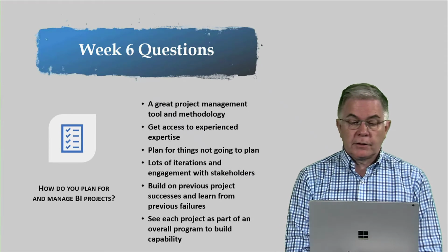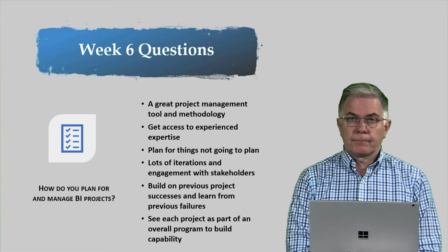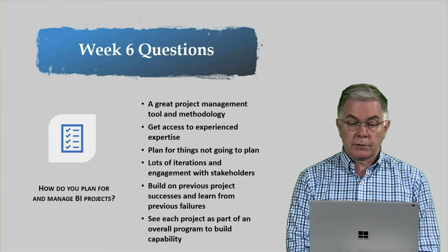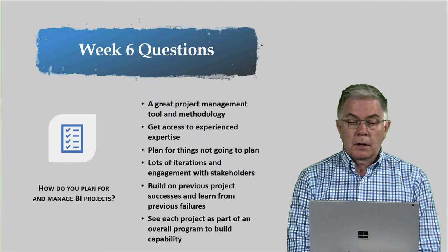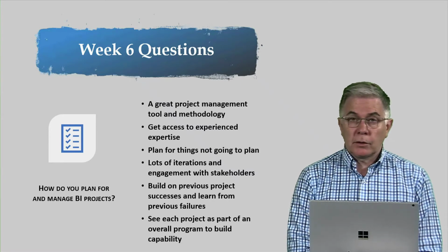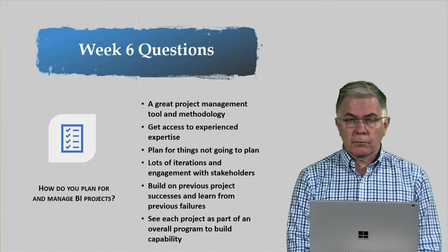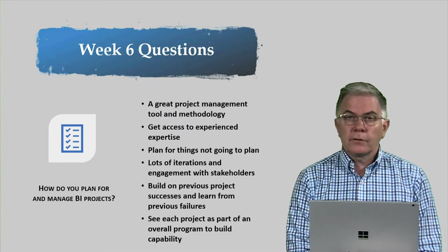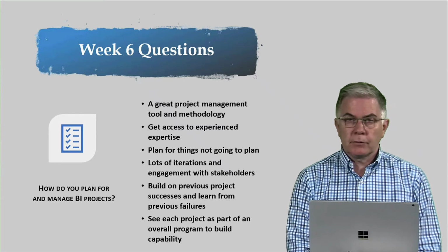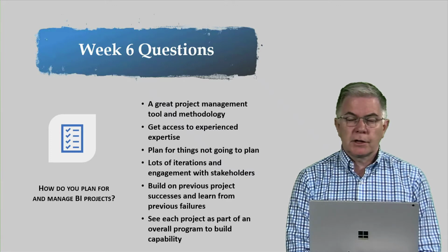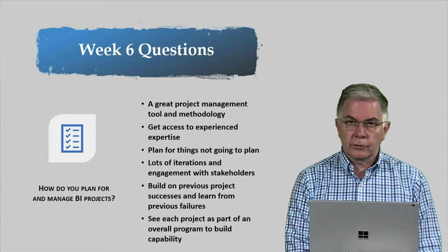Our next question then is, how do you plan and manage for BI projects? Just like IT project methodologies, there are many project management methodologies. So you want to find a great project management tool and a methodology, and a starting point is often what's successful in your organisation at the moment, even if it hasn't been used for data projects in the past. Why is that? Because there's already going to be governance and reporting processes in place. It means that when you're tracking the project and funding it, you're in a much better position because it fits with what the organisation's used to already.